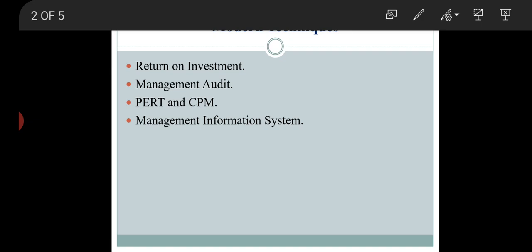So from the PERT network, critical activities are identified, and while making the PERT diagram, these are those activities which, if they are not completed in the particular stipulated time, then the entire project would be delayed. Okay, so the most important critical activities are identified here, and special attention is given to such critical activities, and a separate path is formulated in the PERT network.